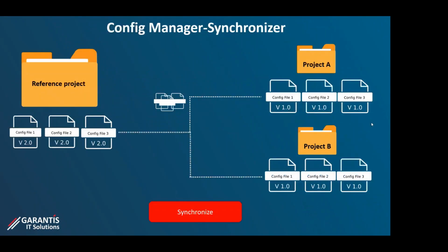So the basic idea of ConfigManager is to take a reference project and to update multiple projects which are located on the same server, or they can be located on a different server. Also, instead of a project, you can take a project template. So it can be project template to projects, project template to project template, or project to project template. So you can mix and match different update scenarios.